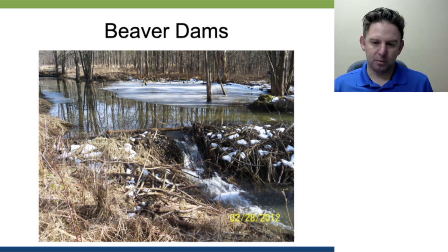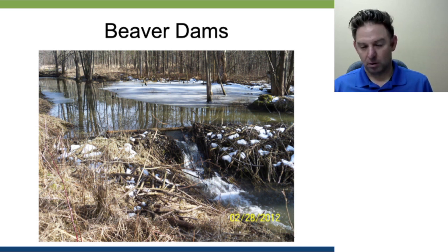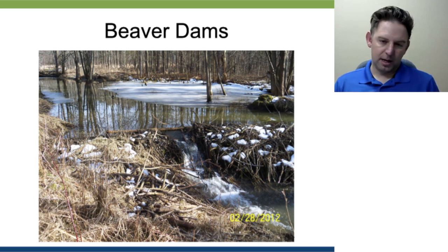The problem with removing a big beaver dam too quickly is that you have a rush of water moving downstream, and we've seen it wash out road culverts or any crossing for that matter. So do them in a safe manner.